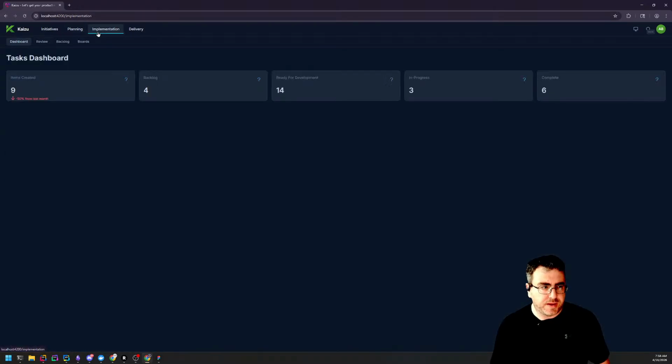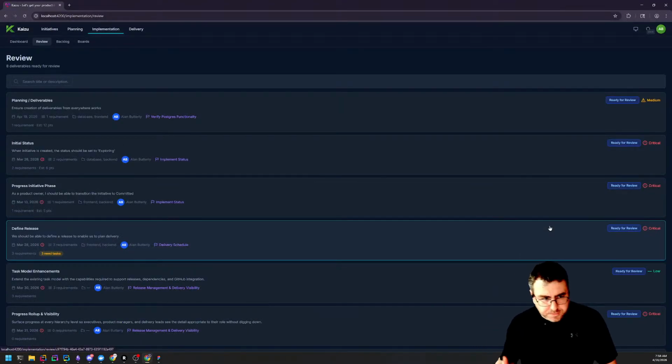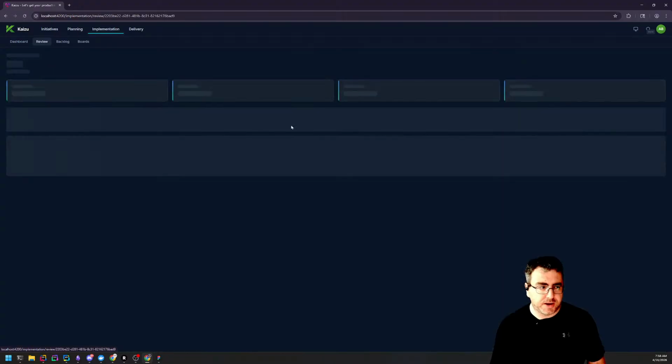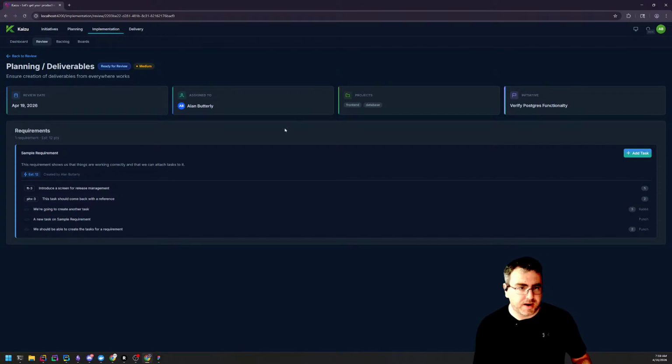So the product manager builds out the requirements, and then when they're ready, they move it to ready for review, and then the implementation, this would show up in review. So now as a developer, if I'm working on a team and I've got some downtime, whatever, anything in review that shows there is for me to look at, right? That's something we're going to talk about soon. So take a few minutes, go and look at what's coming. So this presents it in this form. Here's the requirements. And these tasks then can be added by the developers, the development team, when we come to planning. So the idea here is the product manager would say, hey, we need to meet on planning and deliverables. So let's go through this. Here's the requirements. They present it. Eventually the whys will show in here, right? The initiative why and the deliverable why, etc.